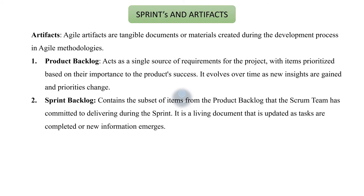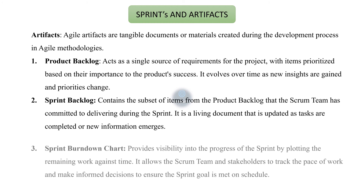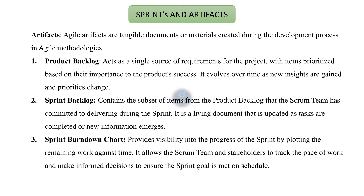The second artifact is the sprint backlog, which contains the subset of items from the product backlog that the Scrum team has committed to delivering during the sprint. It is a living document that is updated as tasks are completed or new information emerges. The third artifact is the sprint burndown chart, which provides visibility into the progress of the sprint by plotting the remaining work against time, allowing the Scrum team and stakeholders to track the pace of work and make informed decisions to ensure the sprint goal is met on schedule.